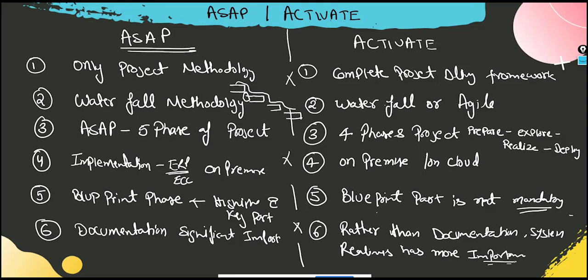The blueprinting is, okay, I will answer in two ways. First, my voice is from Activate. The voice from Activate is the blueprinting is not mandatory. So as per Activate we do not do the blueprinting. We do the other activities which I will explain you when we go into the explore phase. We go to the fit gap. We do the fit gap analysis. We do the fit gap workshops. We prepare the process flow diagrams and those describe your full business process. But as such that blueprinting phase, the name has been removed.